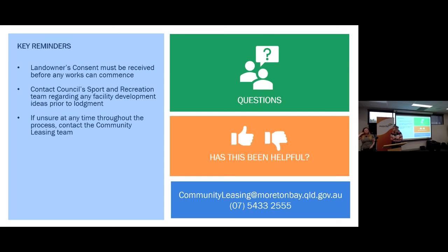Why does an IWA take up to 6 months? Good question, Pete. We have a number of internal stakeholders that it needs to be reviewed by. Again, going back to what Jamie, especially Jamie, was speaking about in the last presentation, it needs to go to all of those planning teams. It needs to go to the building and facilities team, especially if it's building.